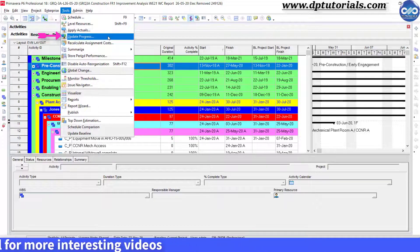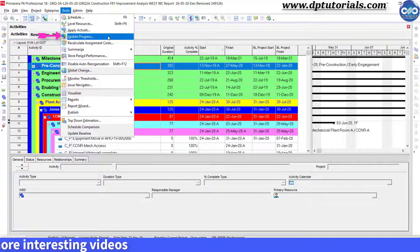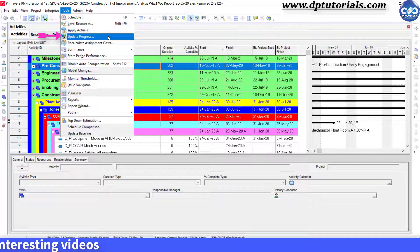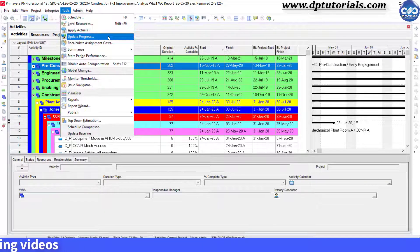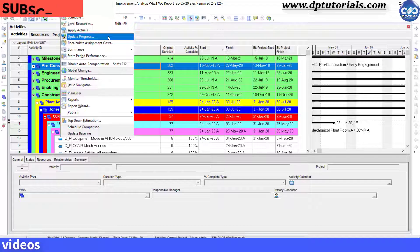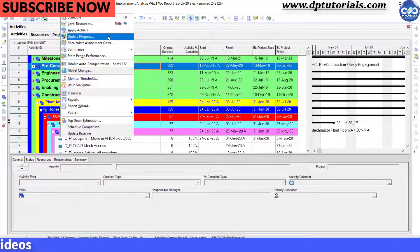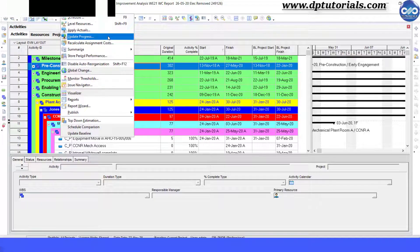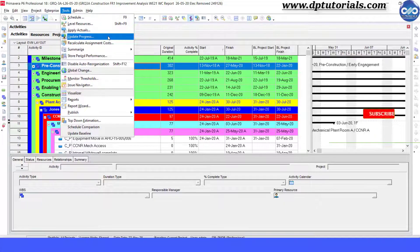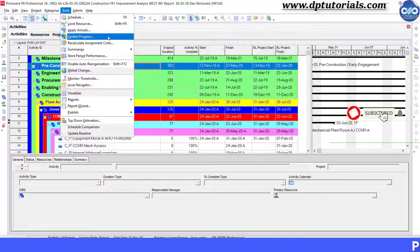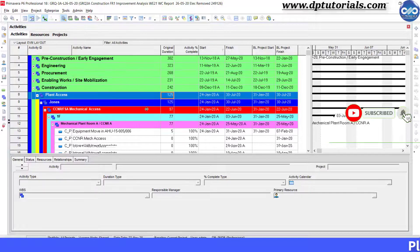Remember, you need to use this update progress feature only when your project is going exactly as per the baseline plan. If not, you should be using the manual method only.